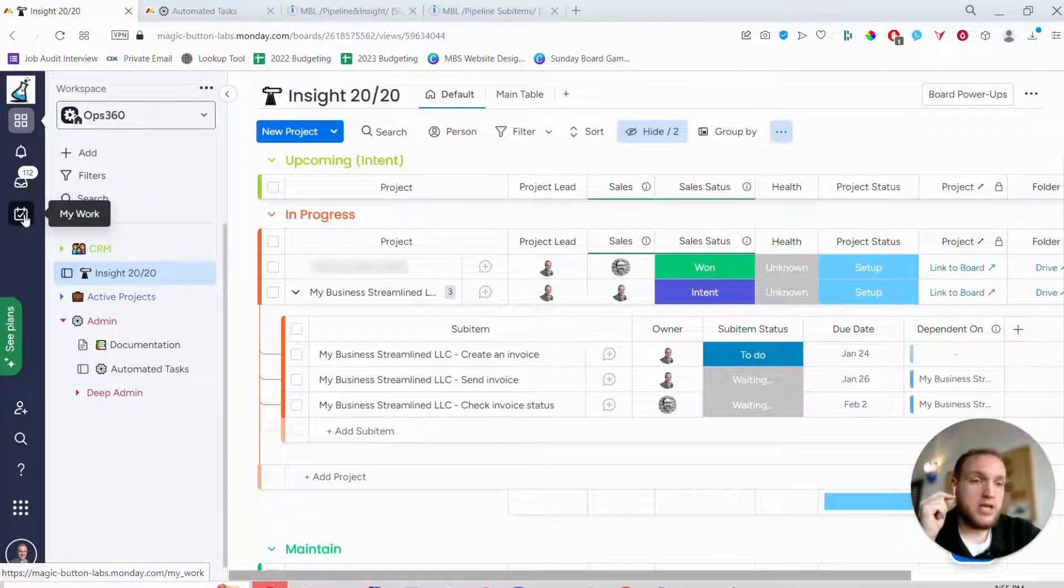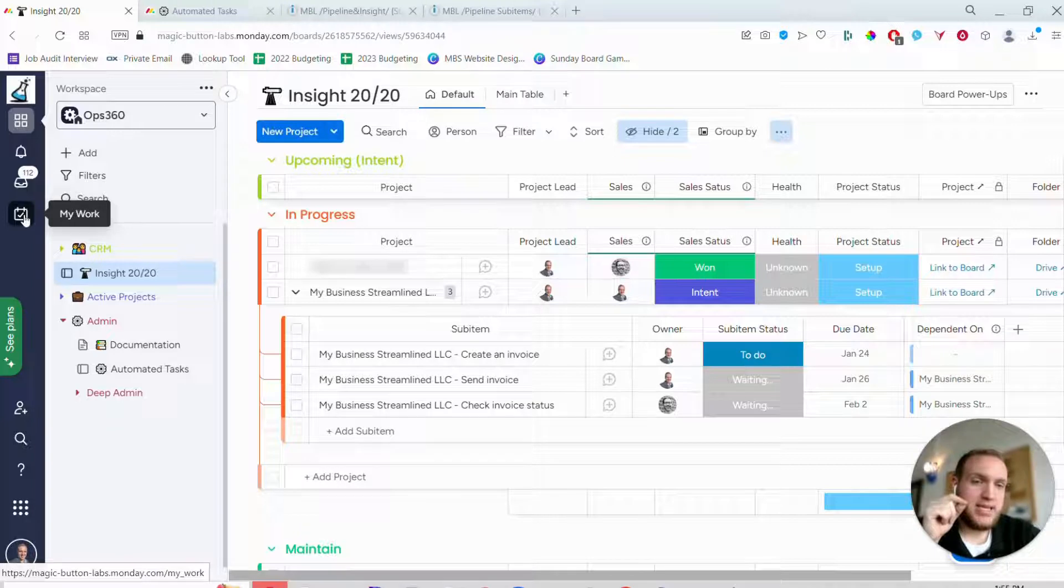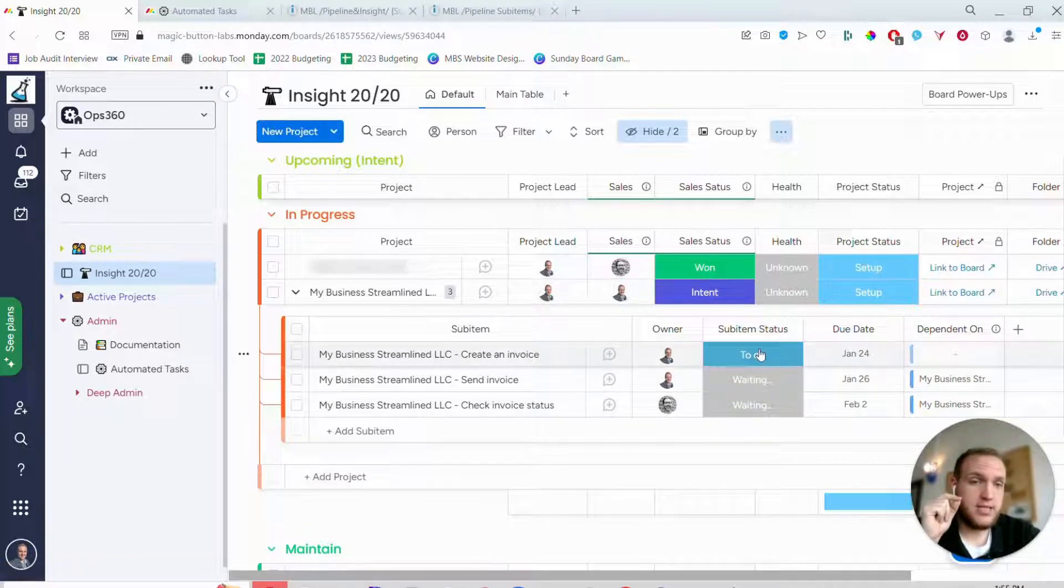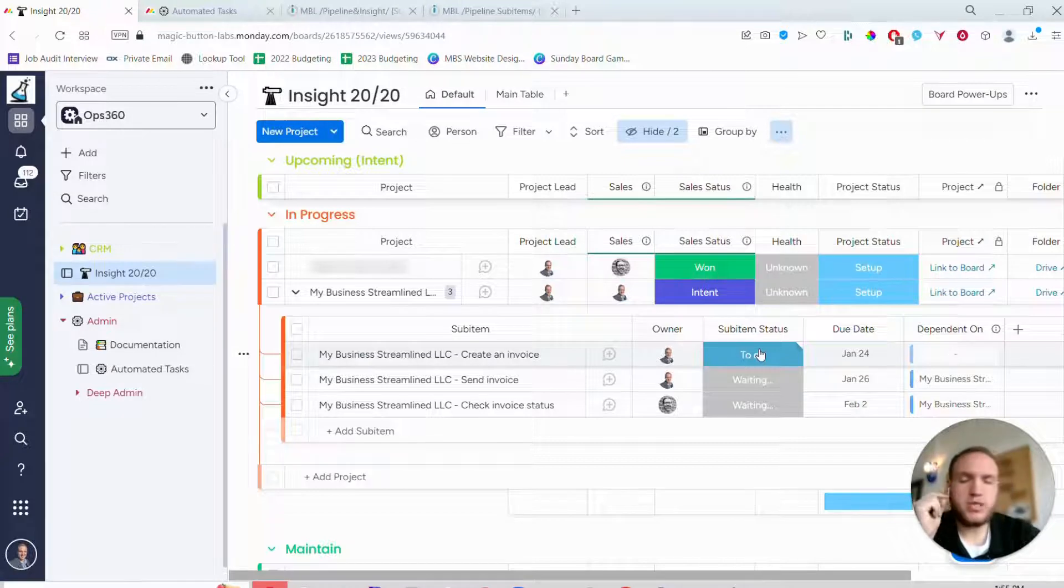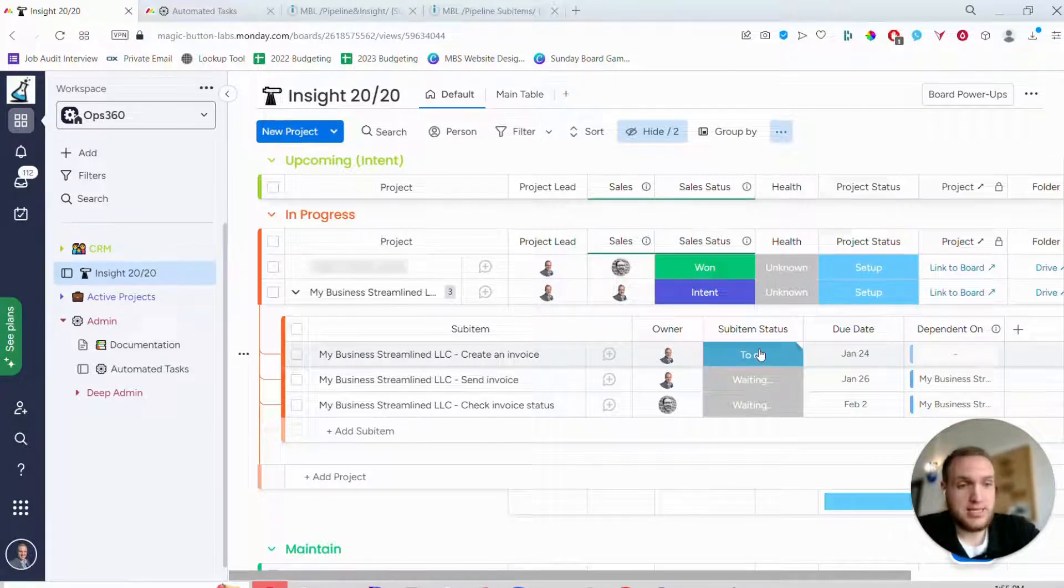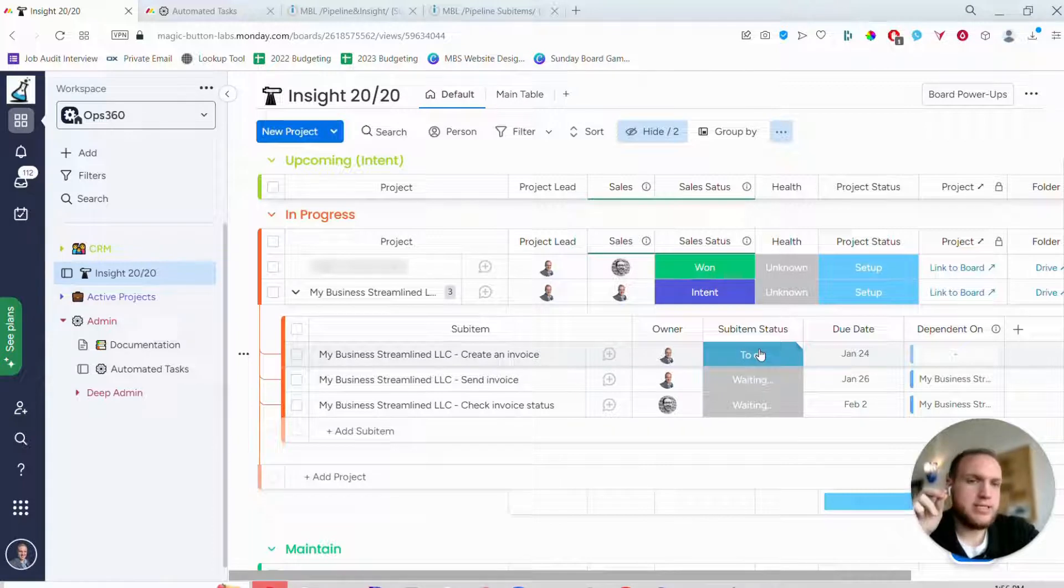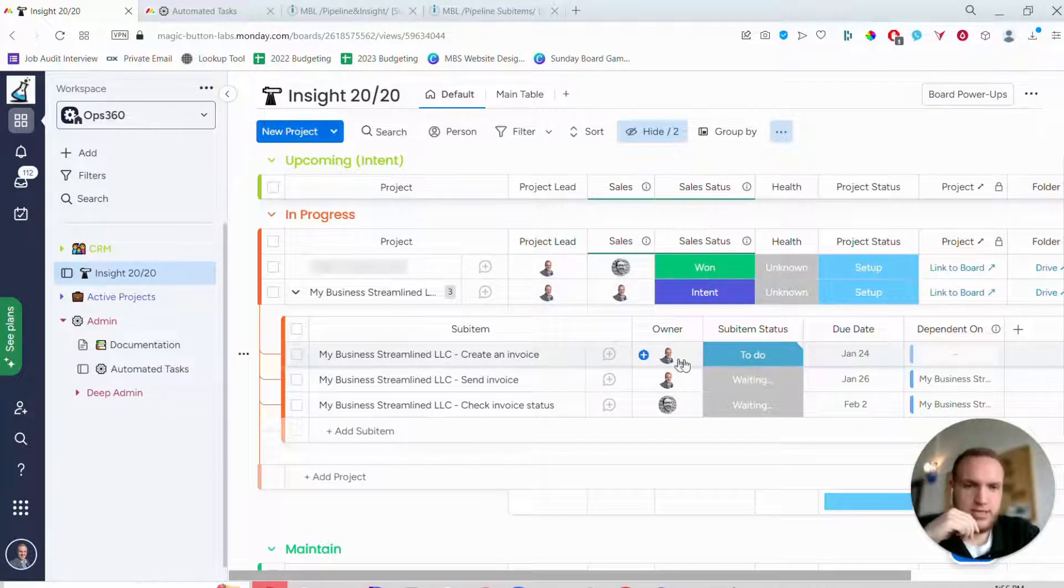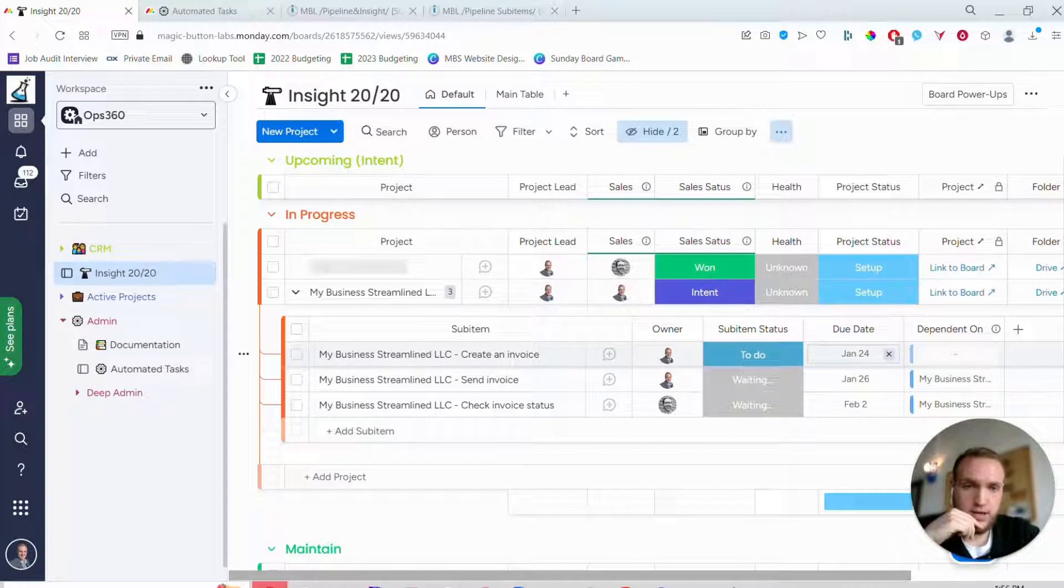So that when people are living in the my work section of Monday.com, they don't actually see the task at all until the status changes to to do. So what this means is you can create all the tasks in here and your team doesn't know that those tasks exist until you trigger them.